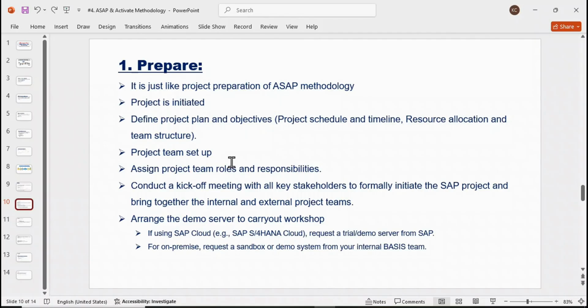I have already explained the free pool concept, guys. Let's suppose a project went to a different organization, so whichever resources were allocated to that project, now all these resources become free. All the consultants become free, and their profiles become part of the free pool. So from the free pool, the project manager will find the consultants, and if one or two consultants are still needed, then they can be hired from outside. Okay.